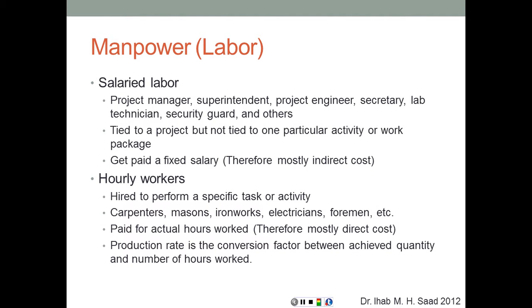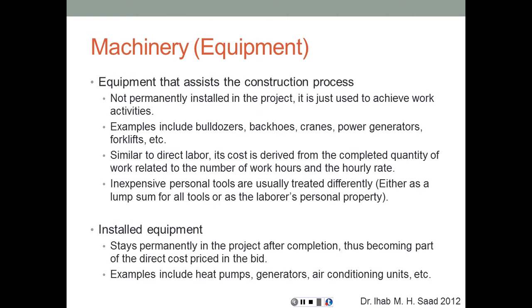The production rate of hourly workers is a conversion factor between achieved quantity and hours worked: P = Q / T, where P is production rate and T is duration or time equals Q divided by P. This gives units like cubic yards per hour or tons per day.